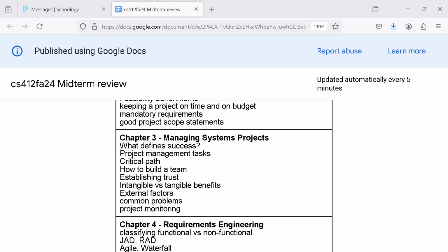The key is, say I've got 3 things that don't take very long. The 4th thing takes longer, and it's needed along with the other 3 things before I can go to the 5th task. Those first 3 things are not the critical path, because there's some slack. If they take a little longer than originally planned, it won't affect my final schedule. Anything that, if there's a delay in it, will delay the entire project, that becomes a critical path.